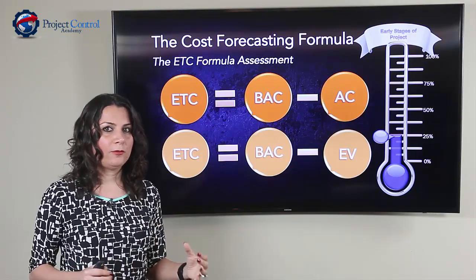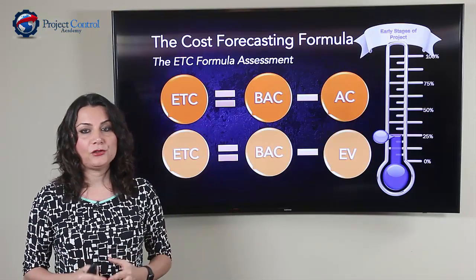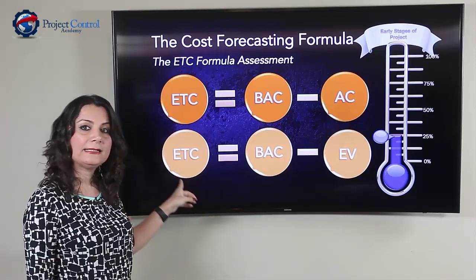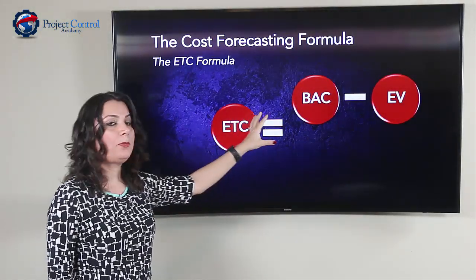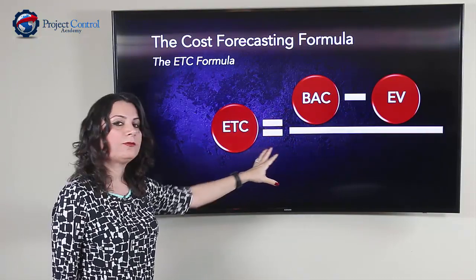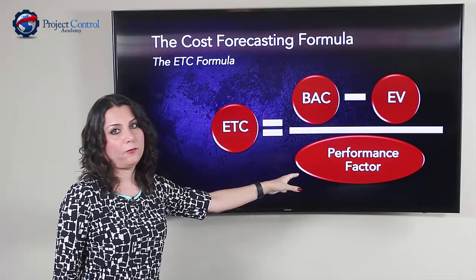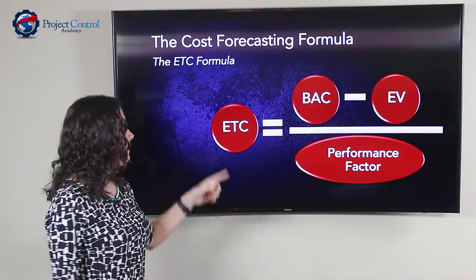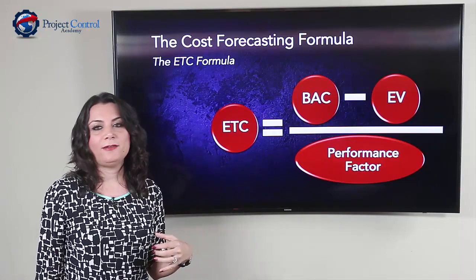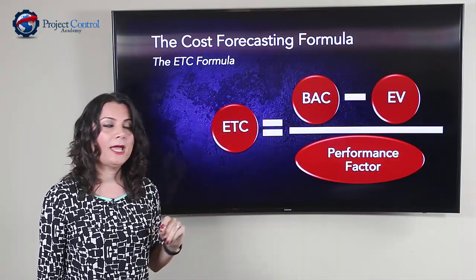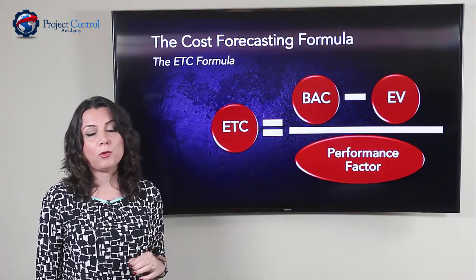If my project performance is bad, do I need more money to finish the job? Yes — I need more money. So to come up with an accurate ETC forecast, I need to factor in my performance. The right formula for Estimate to Complete is not only BAC minus EV (the true remaining work), but also factored by the performance factor. If performance is good — say the performance factor is over one — ETC is less. If performance is poor and less than one, ETC goes up.